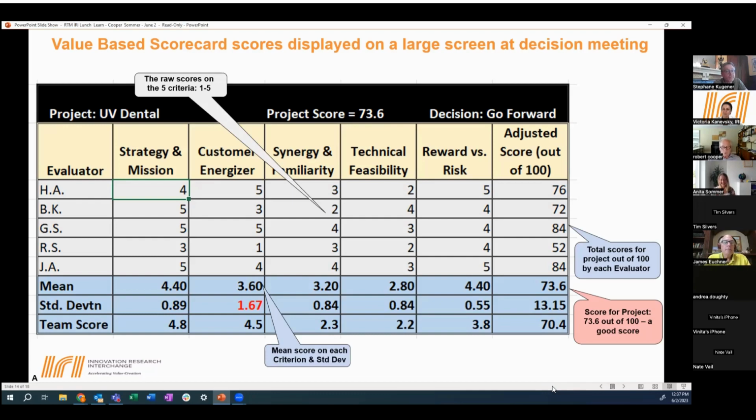One more, and there was a question from the chat that I saw. How can you convince senior management that these scores are reliable? Well, I'll give you one hint, and Anita started to get into it. They're a lot more reliable than financial numbers. Financial numbers, the people that have studied financial numbers given in a business case versus what happened in the post-launch review, compare the two numbers, are wrong by orders of magnitude. So the NPV is wrong by a factor of 2 or 3, probably. So these numbers are a lot more accurate than that.